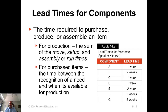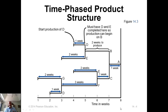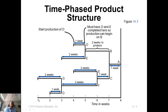So we have to develop what is called a time-phased product structure. We have time on the x-axis — there is no y-axis. You plot the items according to the bill of materials: take the bill of materials, which goes top to bottom, rotate it 90 degrees clockwise, and make sure the lines are lead-time based on the scale of the x-axis. You start from the leftmost point — the beginning of week 1 — and number the weeks all the way across. So week 7 here means the beginning of week 7.